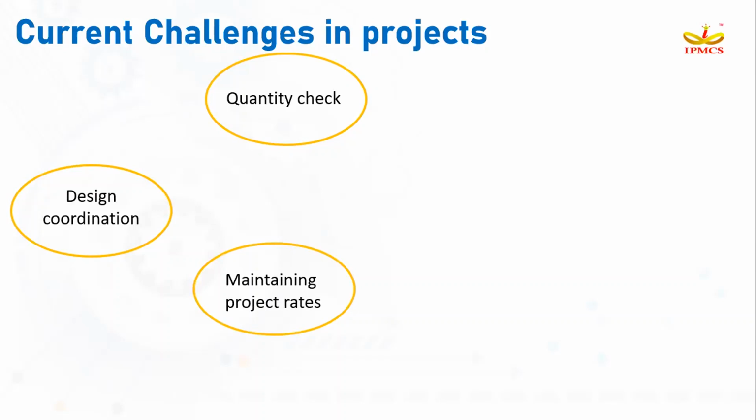The next challenge is maintaining the project rates. In the present scenario, our market rates for each and every material, labor or equipment may get updated every day. So when we maintain it in Excel, we will not be aware of the last updated rate, and what is the last date we updated the present rate. That kind of challenge arises when we maintain rates in the conventional method.